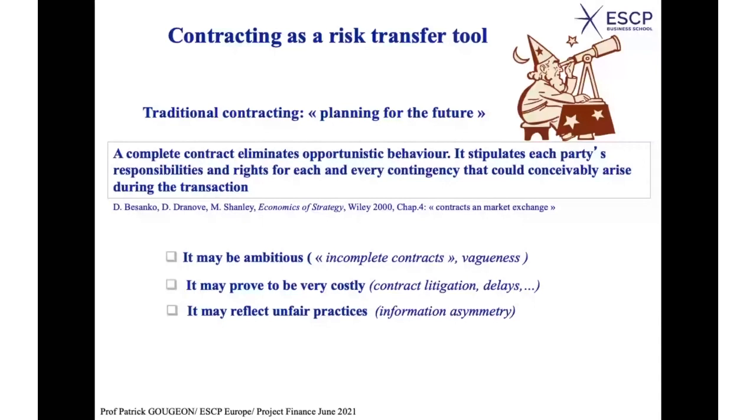So to start with, the facility manager will sign a contract which looks very cheap. In the end, you will spend a lot of money with this facility manager, because he will come to you and tell you, yes, but this is not in the contract, remember, but you should do it, and you will have to do it, okay, and spend more and more money. He knew from the very beginning that you would have to do that, but he didn't tell you, because now he's making more money. He's taking this as an opportunity for making money.